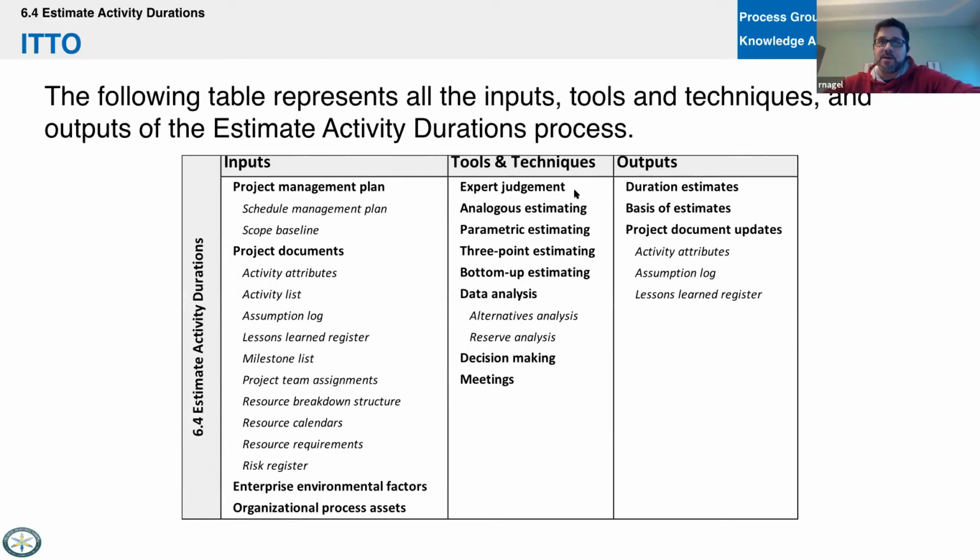Analogous estimating is probably the most prominent estimating that we do in our line of work, honestly. And there are times where it's appropriate. It's very appropriate for the very beginning of the project. We'll do that as a first cut with a client, and then we'll do bottom-up estimating before we get a contract in place. You're already following the PMI process, literally.